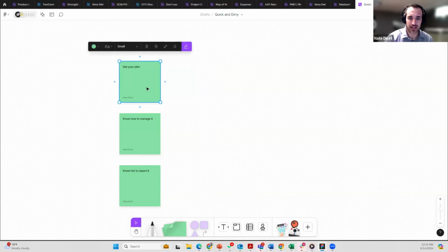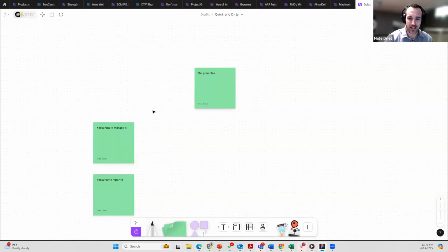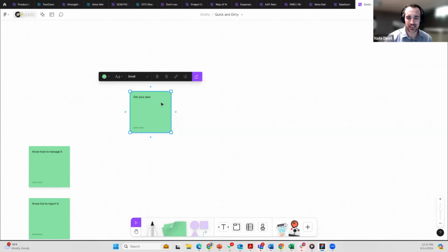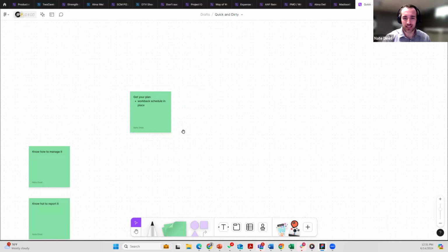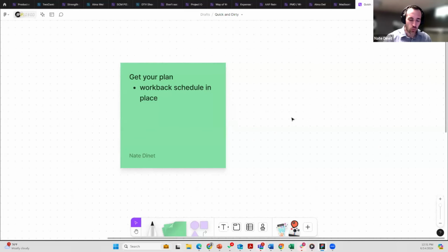So let's talk about getting your plan first. What we mean by getting your plan really is, let's talk about getting a work back schedule in place. Okay, so work back schedule in place is, what is the end date that you're starting with? What is the end of the project? And then working back from that end date with key milestones in mind. So basically, you're trying to plan out the sequence of activities that you're doing from the end of the project to the beginning of the project.